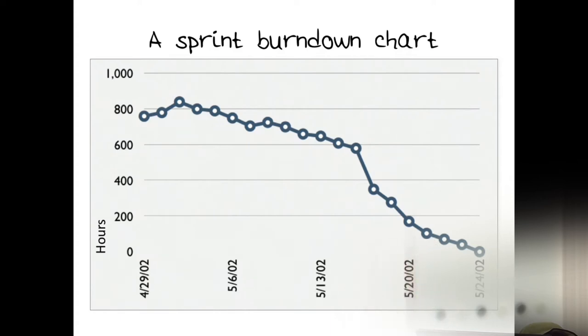So probably what happened here was that the team dropped one of the user stories, and the team cannot do that without conversation with the product owner, right? But if you tell the product owner that if you don't drop any user story, you're not going to get anything, nothing is going to be finished at the end of this sprint. However, if we drop one user story, you will get at least two out of three of the user stories that you want us to do. So it's used as a kind of management tool.